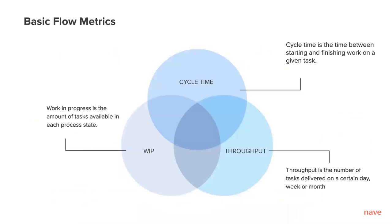There are three basic flow metrics that can help you measure the performance of your workflows. Cycle time, which measures the time between starting and finishing work on a given task. Throughput, which is the number of tasks delivered on a certain day, week, or month. And work in progress, the amount of tasks active in each process stage. The goal is to limit work in progress, reduce cycle times, and increase throughput.